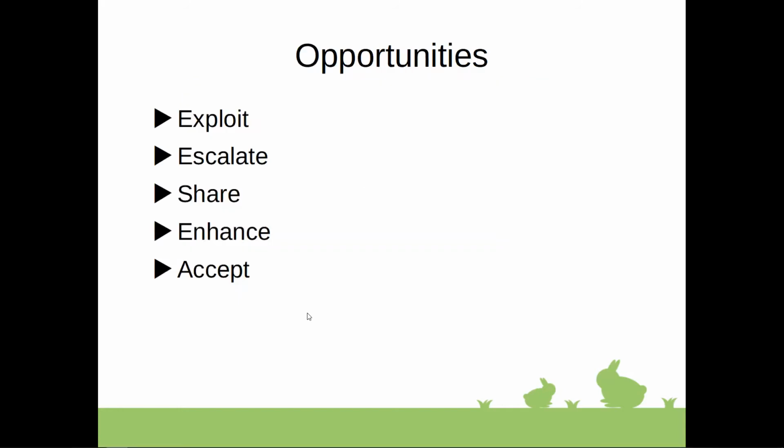Opportunities. Opportunities are events or conditions that, when occurring, have a positive impact on one or more project objectives. An example of an opportunity would be a subcontractor finishing work early, resulting in lower costs and schedule savings. There are several strategies to deal with opportunities.